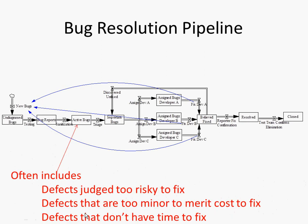Then you get to a stage of what we call active bugs — an active defect report that's been sanitized. We're confident it's not just a duplicate of another one previously reported, and we're confident it's not based on some big misunderstanding. That process of sanitization takes a bit of effort — someone has to actually think about it and say, is this real? Often the process of triage will involve some of that, and a test lead takes the lead on wading through the bug reports and asking, is this a duplicate?